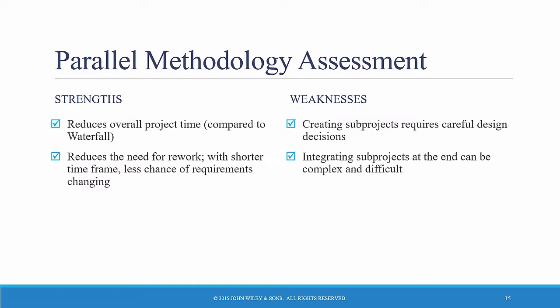Parallel development reduces the time required to deliver a system, so changes in the business environment while the system is being developed are less likely to produce the need for rework. However, the approach still suffers from problems caused by voluminous deliverables. It also adds a new problem: if the sub-projects are not completely independent, design decisions in one sub-project may affect another, and at the end of the project, integrating the sub-projects can be quite challenging.